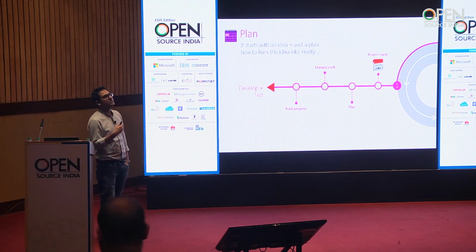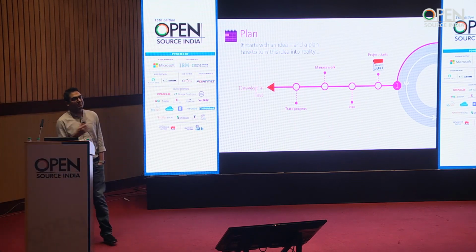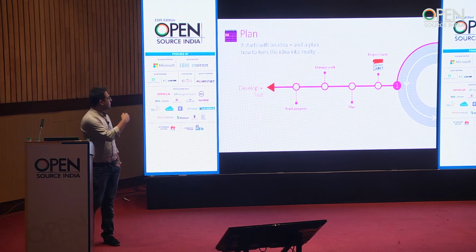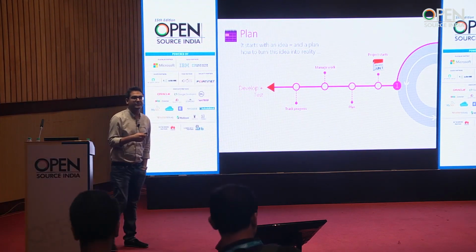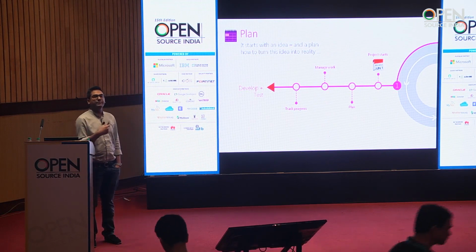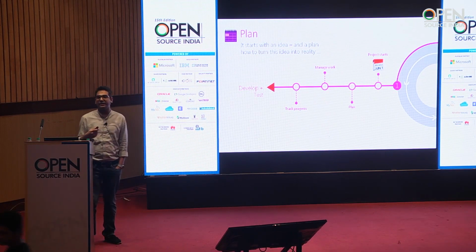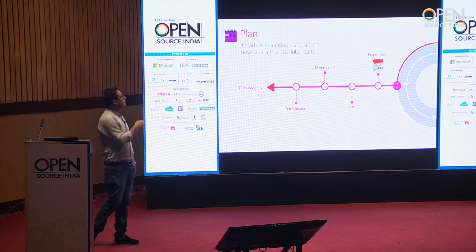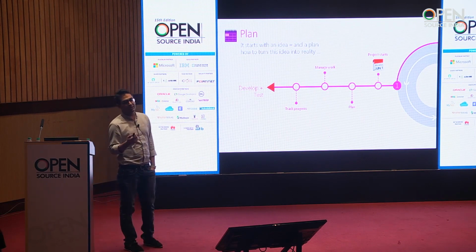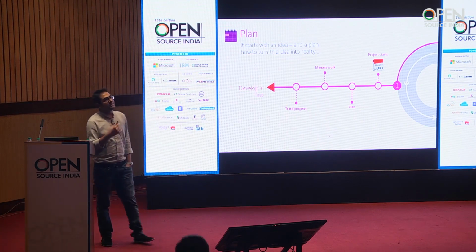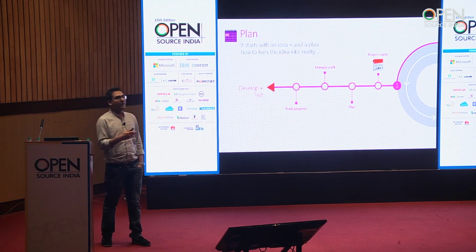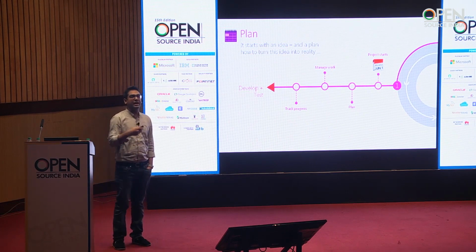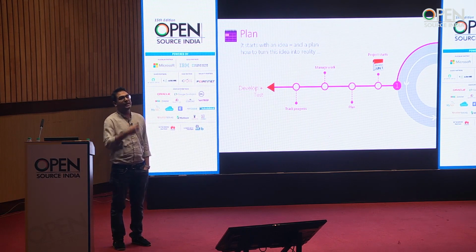We at Microsoft follow a sprint model. So you have the agile implementation of that, and if some of these words are interesting to you, we can obviously have a deeper conversation because this is a huge topic that cannot be covered in 30 minutes. But I want to leave you guys with thoughts and pointers as to what you can start looking at after the talk. In planning, we follow a 3-sprint model where we have visibility. When we are doing our planning, we plan for 3 sprints, where the 3-sprint plan gives engineers and the team a vision of what they will be doing over the next 3 sprints.